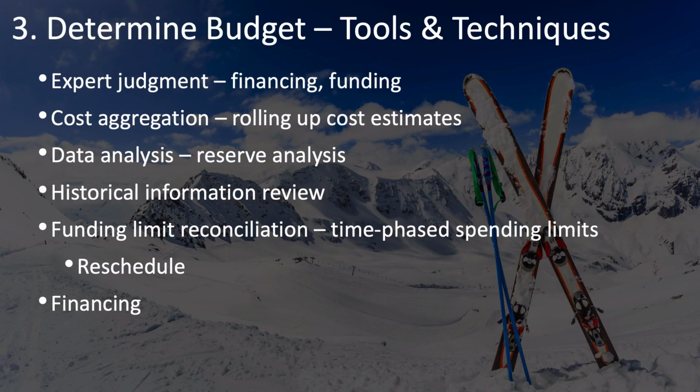Tools and techniques for determining your project budget include expert judgment, of course, at the top of the list, especially experts in financing or funding of projects. Cost aggregation is the rolling up or summing up or adding up of the cost estimates into a complete project budget.